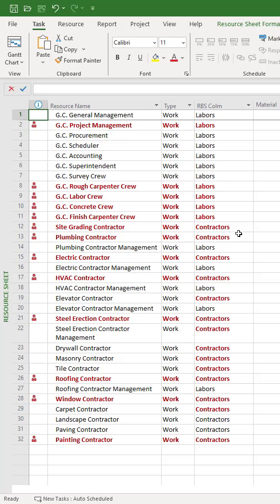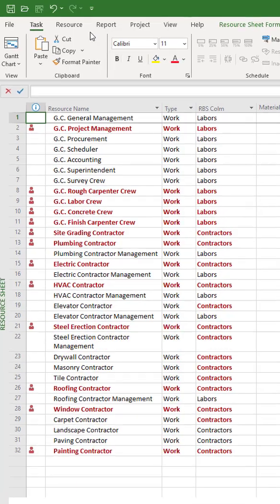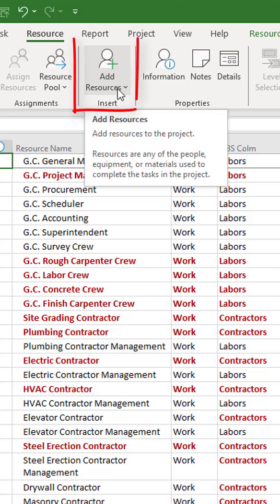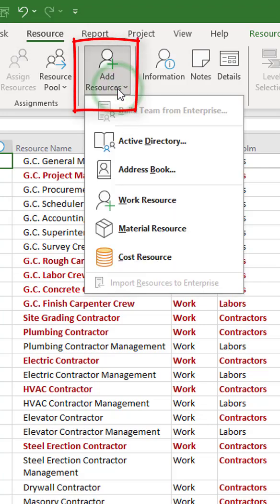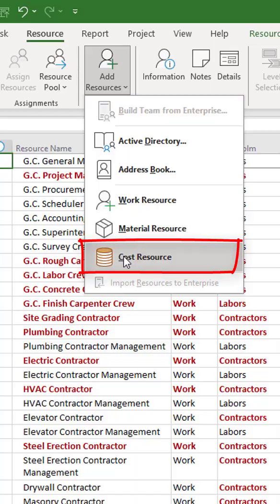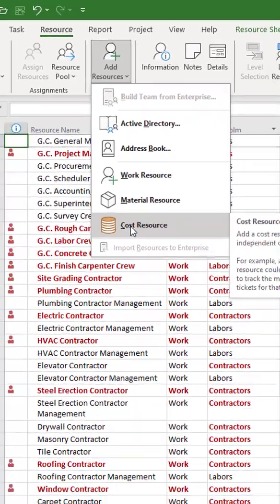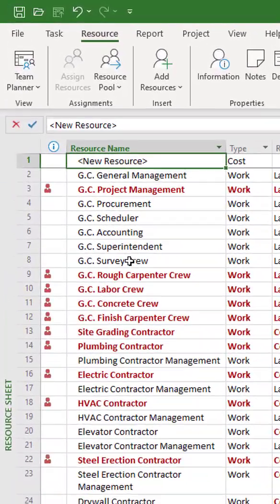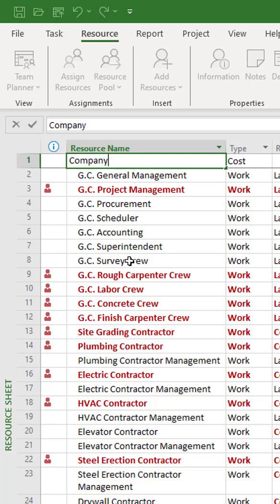To create a new budget resource, click the Resource item in the top menu and click the Add Resources button in the ribbon. In this menu, select the Cost Resource item. Microsoft Project Pro has created a new resource and you must rename it.